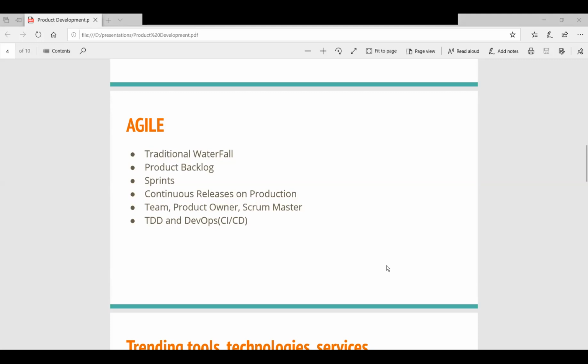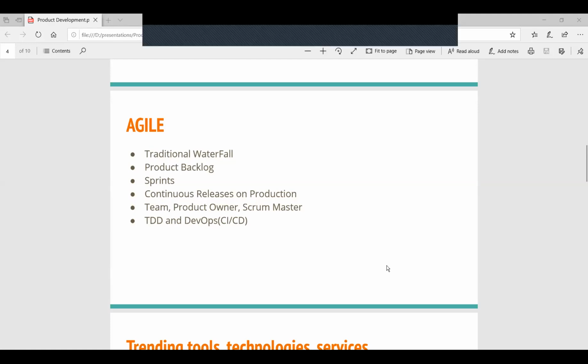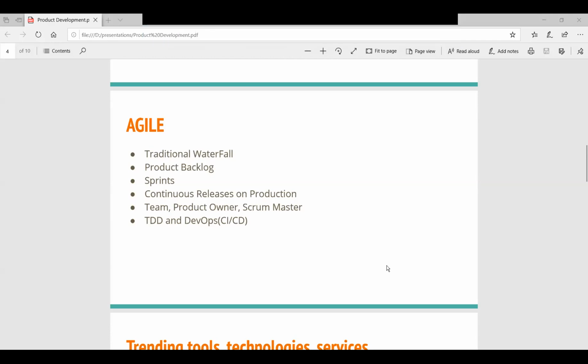These user stories are created and dropped into the backlog. The product owner is the one who prioritizes the features, based on what is required to be rolled out to production. He can say that the login-logout user story is not required, deprioritize it, and generate a new user story, like, as a user, I want to see a dashboard without login. That's fine. It is the product owner's responsibility to prioritize.